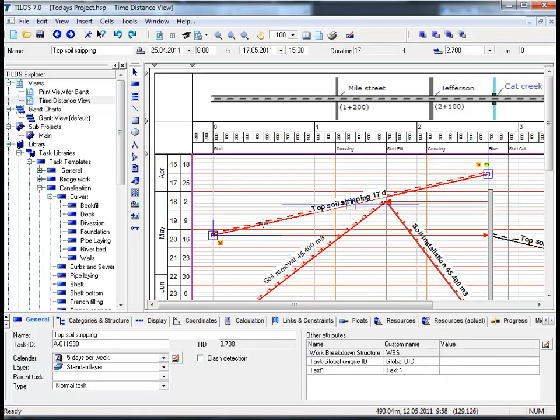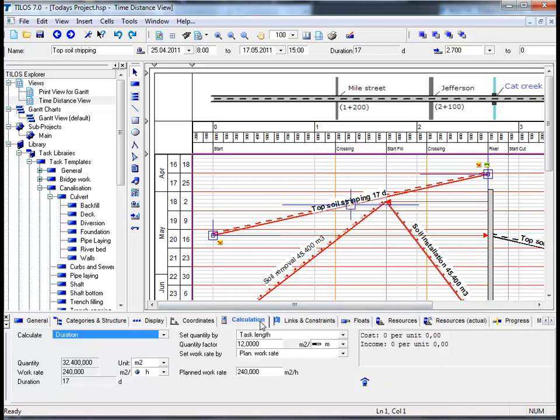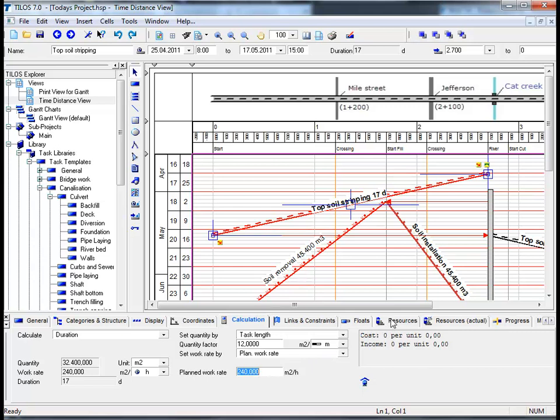From the previous session we learned that it is possible to estimate the duration of a task to be carried out without resources solely on the basis of quantity and work grade. If we move on to the calculation view tab in the details toolbar we can see that in this case it was 240 square meters per hour which had to be achieved. We now want to move along to the resources view tab in the details toolbar.